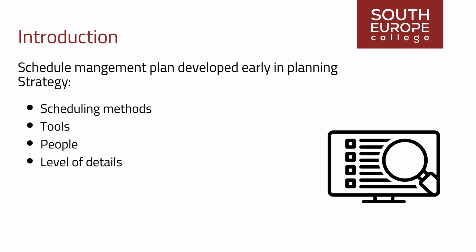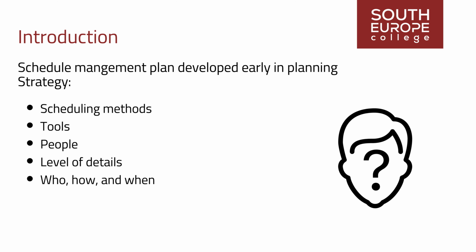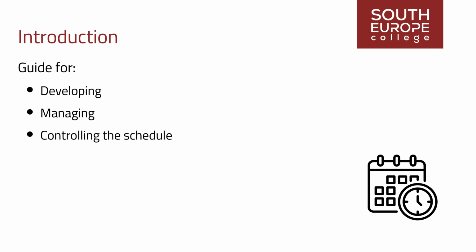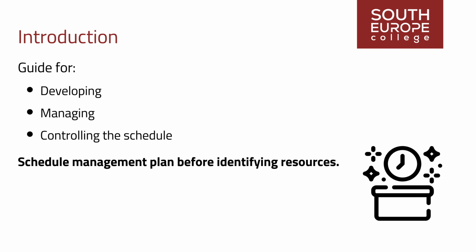In addition to that, it highlights who, how, and when the schedule will be managed, monitored, and controlled. It serves as a guide for developing, managing, and controlling the schedule throughout the project. Since some project team members may participate and have roles in developing the schedule, it is logical to define the schedule management plan before identifying resources of the project, as this will impact the needed resources and their assignment start and end dates for the project.